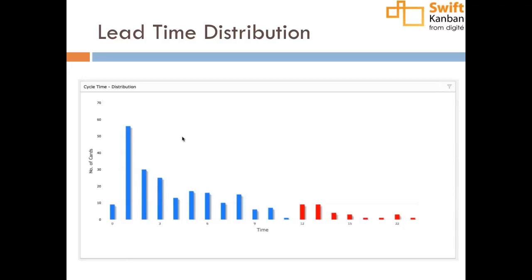And the mix of cards, and those are your sort of measurements, and controlling the WIP at the right places to make the flow more continuous, reducing the blockings or other causes that cause the cycle time distribution to have a long tail, right?